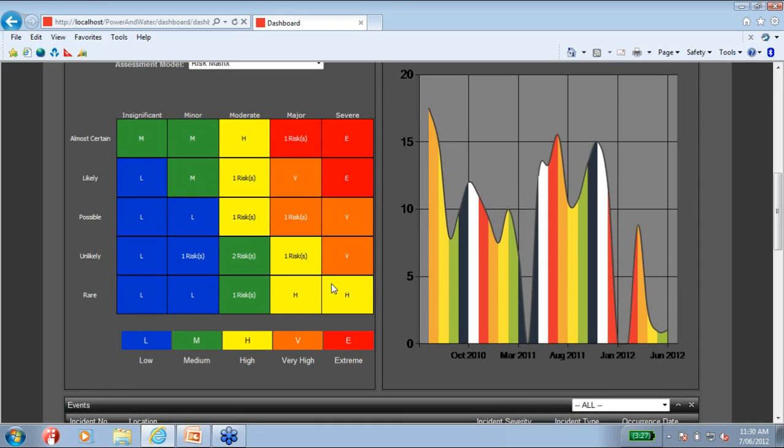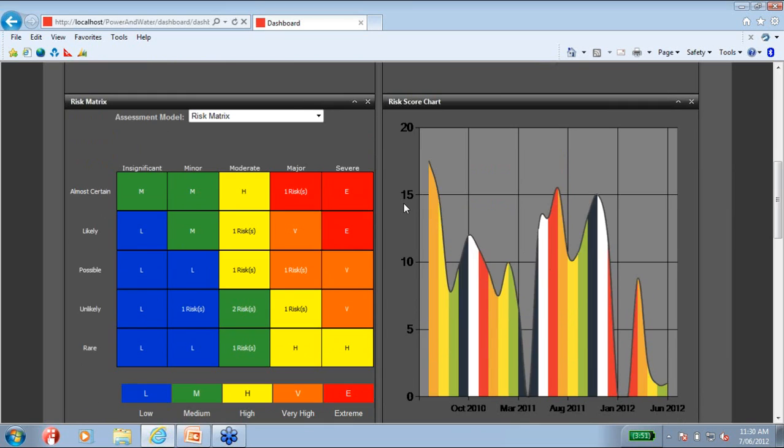Now what this means is that, if you've got a $30,000 project, and you've got a contractor involved that is, say, $25,000 of that, you can identify the management of that contract as a high risk to that project. But when that then gets viewed in your corporate model, it may come out as a low risk because it might even be a rounding error on your organisation. So these are examples of the types of things that we can do in the dashboard.